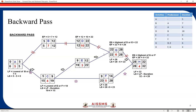For activity G, there are two preceding activities: D and E. We copy the late start of 22 as the late finish for both of these activities. For activity D: LS = 22 − 10 = 12. For activity E: LS = 22 − 3 = 19. This late start of 12 for activity D acts as the late finish for activity B, so LS for B = 12 − 7 = 5. This 5 then acts as the late finish for activity A, and LS for A = 5 − 5 = 0. So activity A can start as late as day 0.